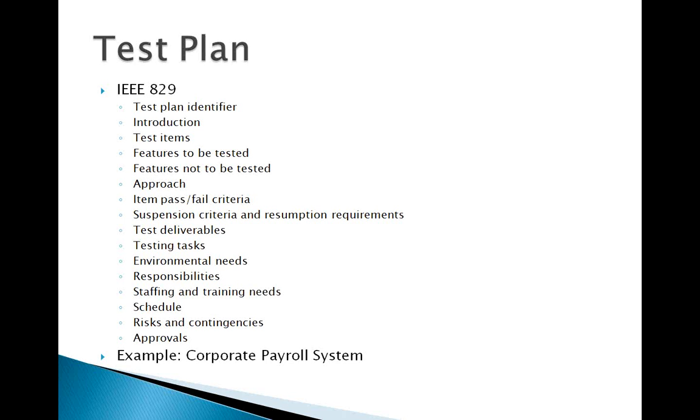And then of course it will cover a broad schedule for the various milestones, not in terms of the nitty-gritties of an execution plan, but a broad schedule of various milestones. So let us say either it is going to have 12 sprints, or if it is a conventional model, then when is alpha, when is beta, when is RC and GM, things like that.